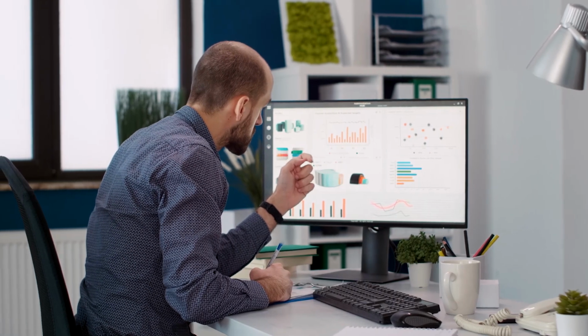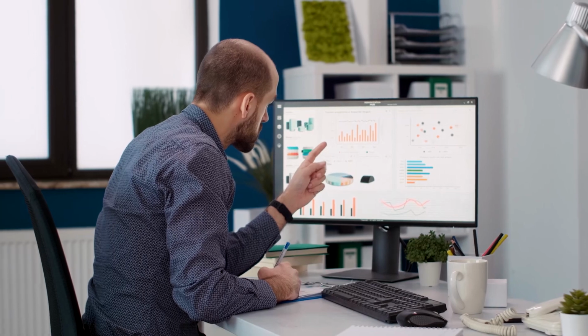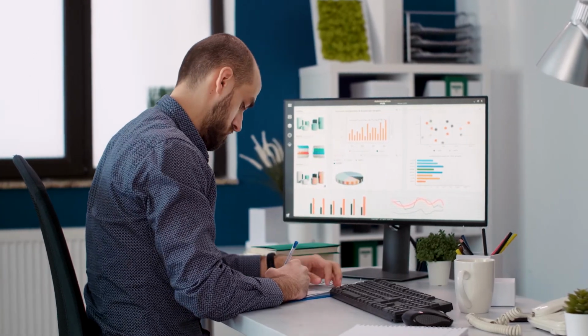Oh, Adriana, I don't think velocity is a good measure for team performance because all velocity tells us is that we did some work as a Scrum team. It doesn't tell you that we created any value for the customer. So I know velocity is a common metric, but that's all I would say on velocity. And I think throughput is definitely a good one. Throughput, that's kind of like Kanban. We're looking at how many items we're getting through certain cycles of the business all the way to the end. Your comments on that?